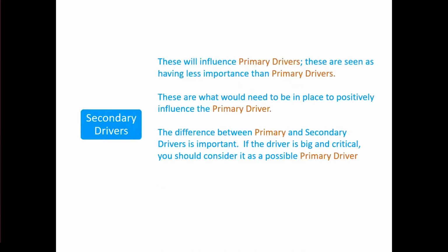And again, as I had said, you don't always have those secondary drivers, but if you do, remember that those secondary drivers actually influence the primary drivers. So those are the things that you will need to have in place to positively influence your primary driver. And the difference between your primary and your secondary drivers is an important one. So if the driver is big, if you have a secondary driver that's getting large in concept, you might want to consider moving it over into the primary driver column and working from there. So just some thoughts to keep in mind when you're developing it.